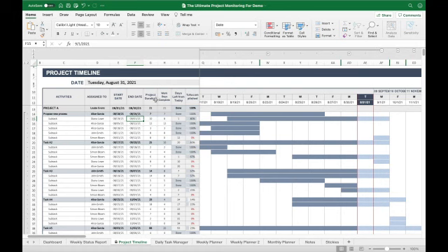Okay. So now for the project duration, it also computes automatically. If you count again, for all the work days, it will show that it is 10 days. So 1, 2, 3, 4, 5, 6, 7, 8, 9, and 10. And then you can see that the percent accomplished automatically updates, and you will also have a dynamic representation or visualization of your accomplishments. Like for example, in this data bar, it shows that you are 80% accomplished, and it is accompanied by the filling of the bar here in the cell J15.